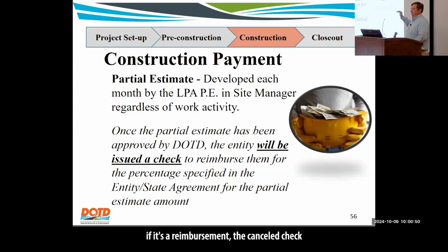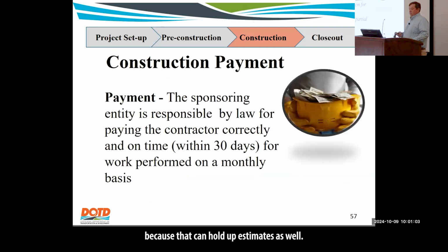Again, if it's a reimbursement, the canceled check from where you've already paid them. If it's a disbursement, the canceled check from previous estimates have to be in there, that sort of thing. So make sure all that documentation is there, because that can hold up estimates as well.